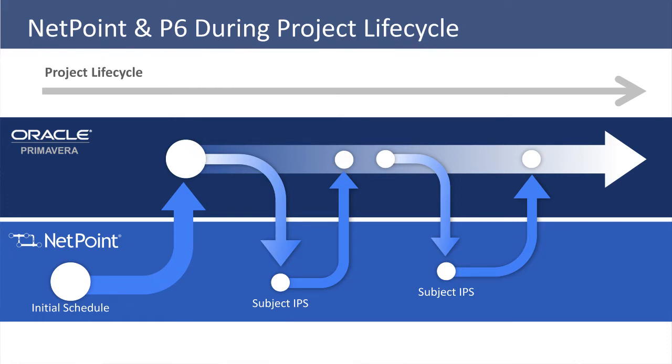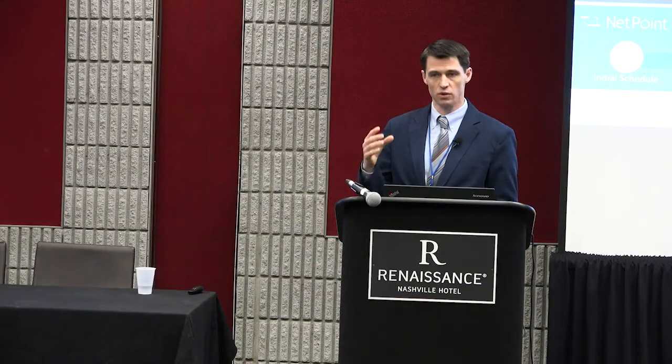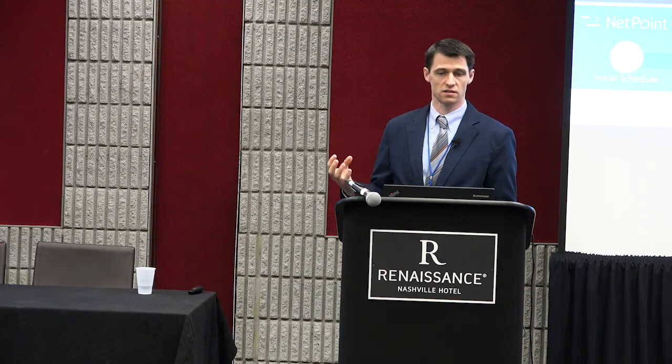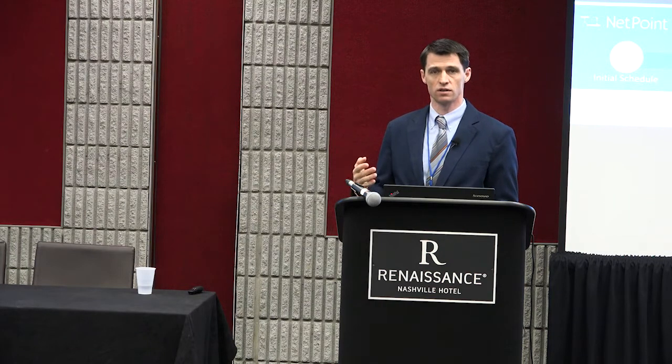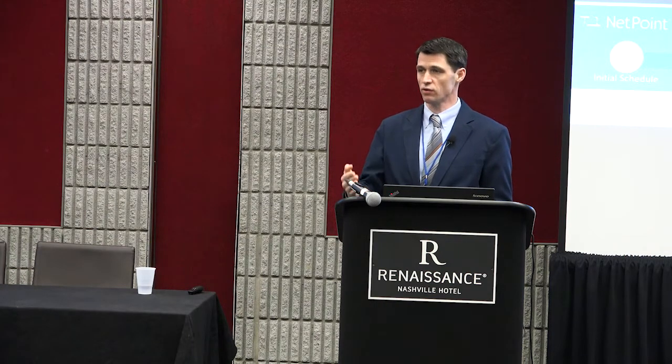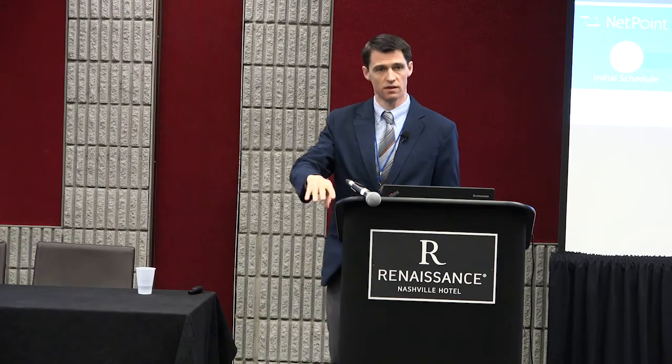It was at that point that we rolled it into Primavera to allow for more detailed planning and to allow for, this will be an integrated schedule, so we'll have XERs from the designer and the CM and the validation company all working in harmony together. But what we found was that we wanted to keep doing IPS sessions in Netpoint. The audience liked the tool. It was a very efficient effort for us. And now we were determining, now we have a great work product in Netpoint, and we have a great work product in P6, and what do we do now?